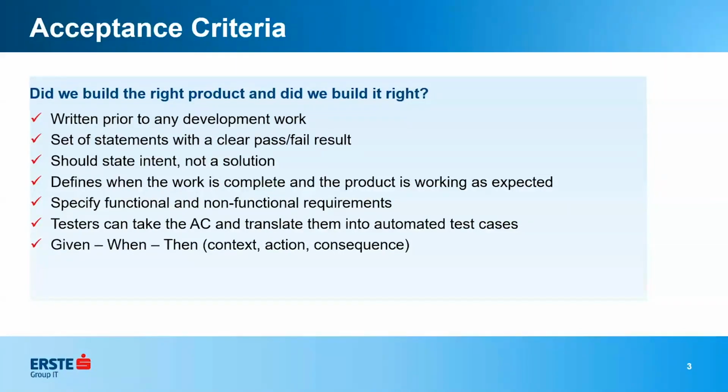Yep, it is. BDD is actually fantastic, and it works really well with writing good user stories. When you're done with your sessions, whether you call them deliberate discovery or BDD sessions, where the whole team comes together and talks about how the customer behaves and how we're going to formulate this, you come up with different scenarios. Those scenarios can be used as acceptance criteria. So it's kind of perfect.